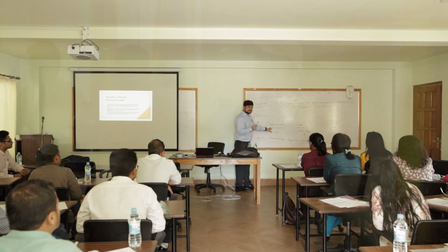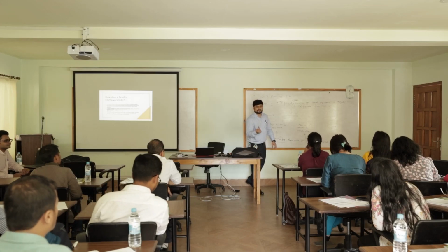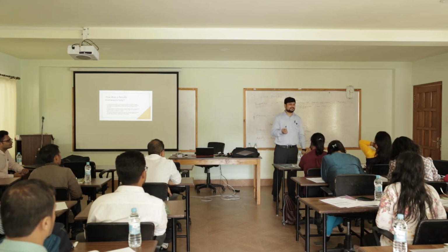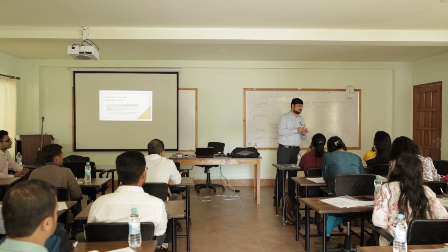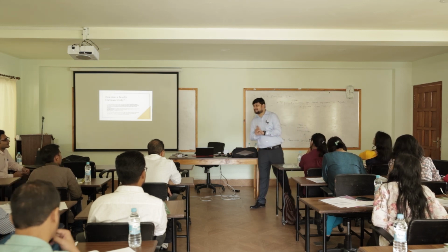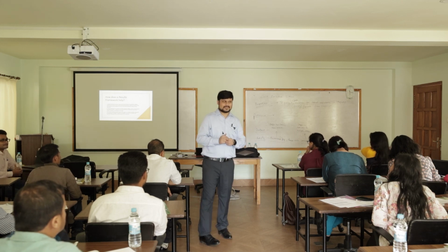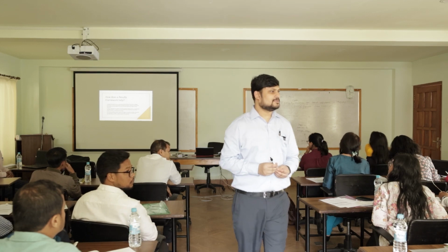In this case, if you would want to see what was the indicator, the proportion of people that have become more aware, or the number of people that have become more aware, that is your indicator. Indicator has to be measurable, right? So you can measure it in three different ways. You can either talk about the total numbers, or you can talk about means, or you can talk about percentages. Sorry. What is the difference between output indicator and outcome indicator? Yeah.